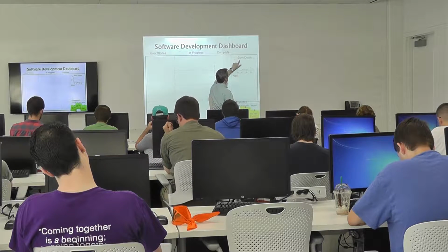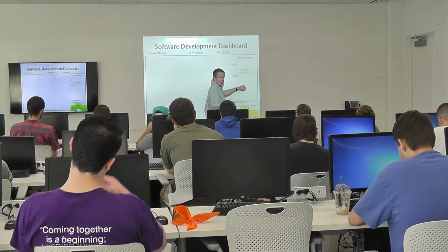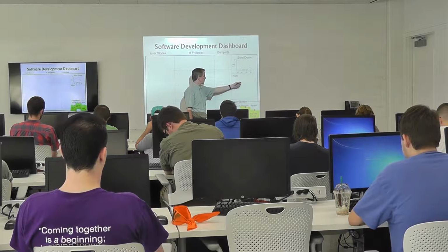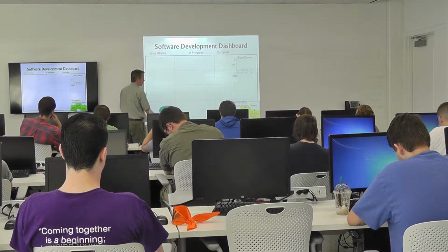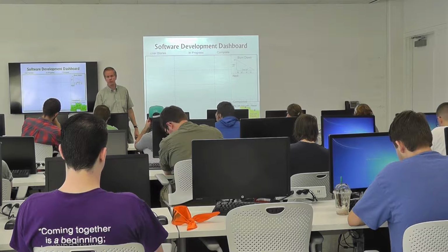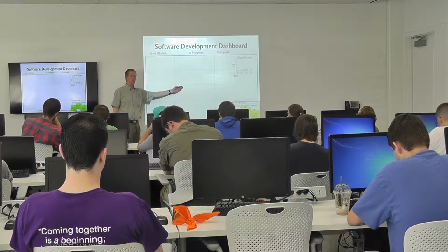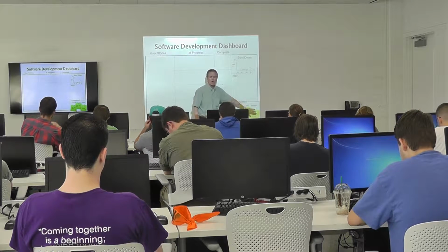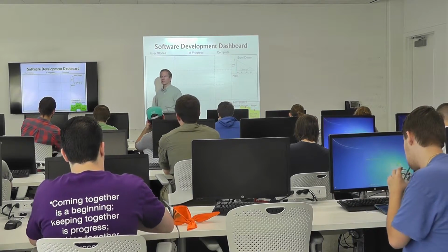During the project, we had a burn down chart, and we would track how we were doing on that one. If there were any tasks that for whatever reason we decided not to do halfway through, we moved them over into the next section so we wouldn't forget about them for the next time. And we even had this little section down here just in case there were any surprises that showed up, like the boss showed up and told us we couldn't leave at the last minute. Of course, the boss would be left to do that. There would be no problem. Let's go ahead and put it here, and then we'll work it into what we're doing. But anyway, we're at the end of the project, so hopefully all of our stuff is now down here in the lower right-hand corner. And so we've gotten all that stuff taken care of.